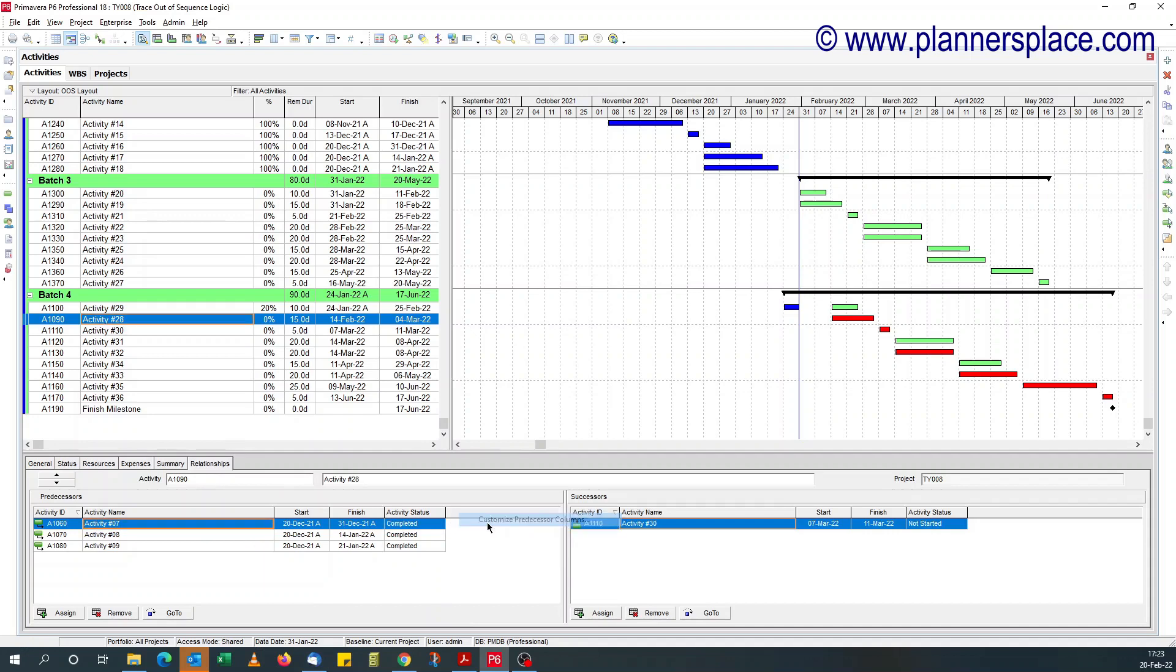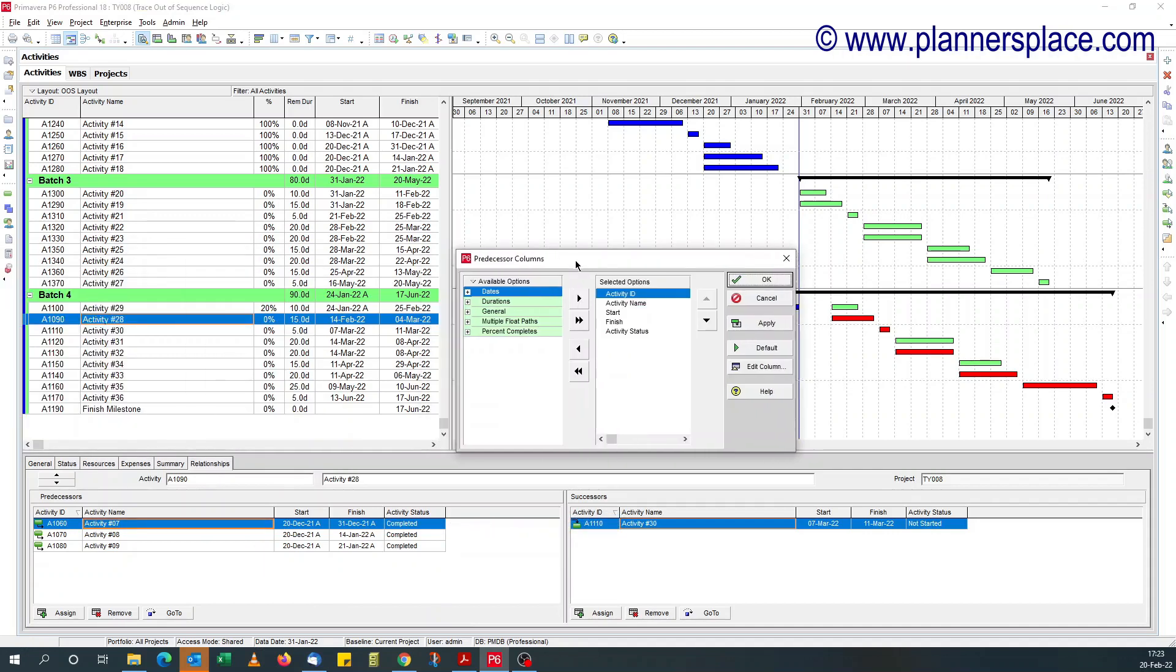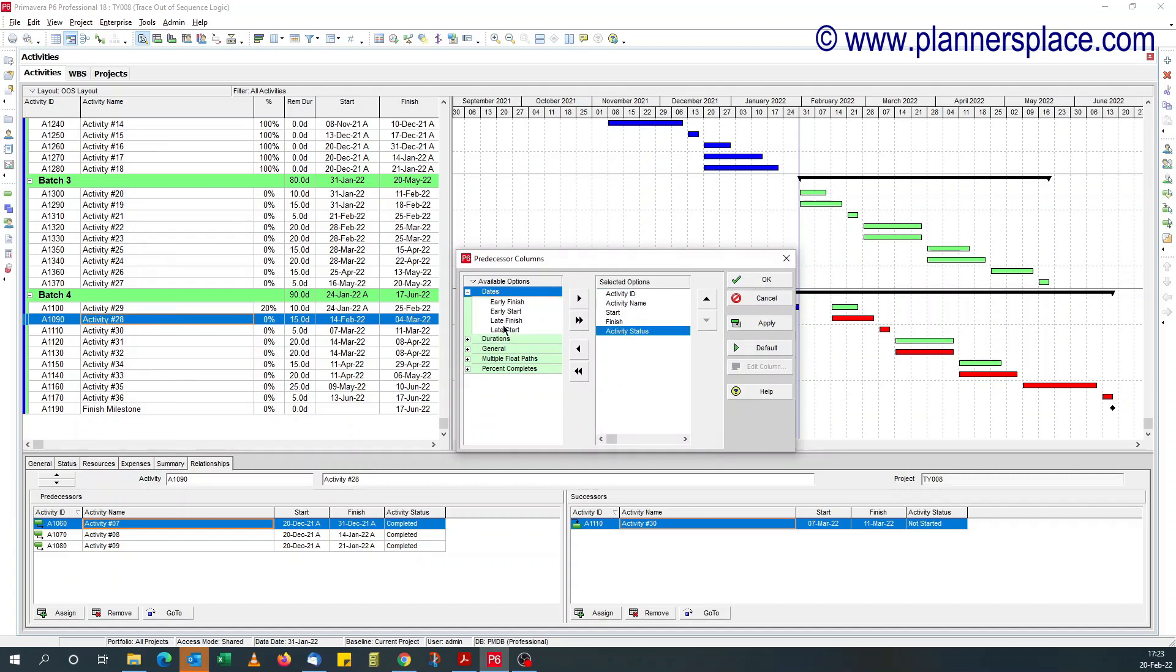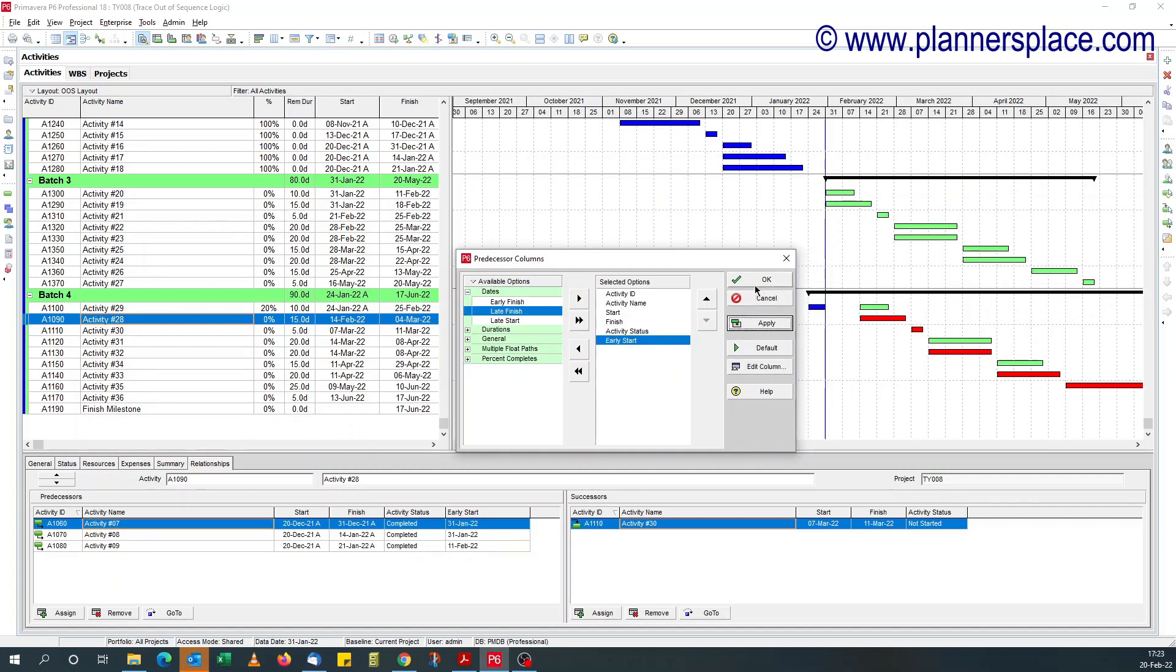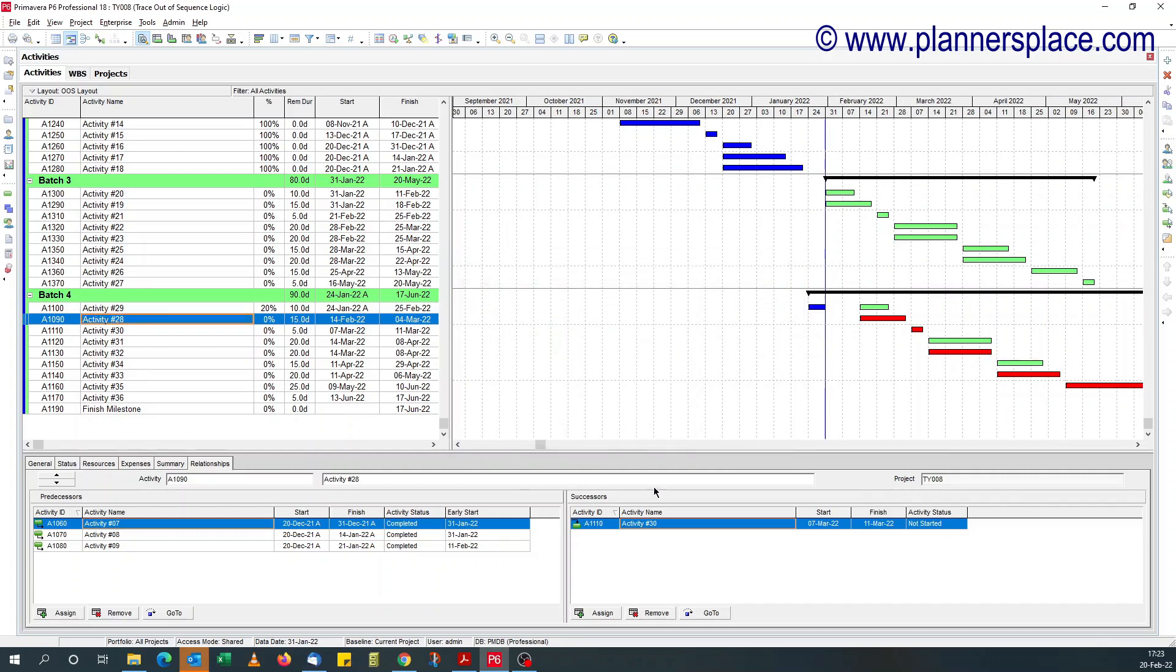So the field to add is the early date. If you go to dates, add early start date. You add the early start date.